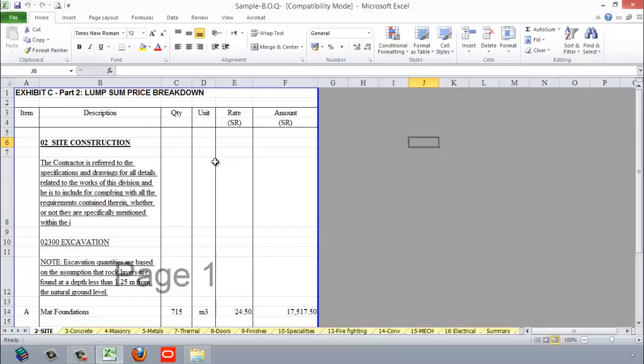Another milestone could be the superstructure. Superstructure is everything related to the concrete works, and this one could be another controlling milestone. It will help us to identify when we should finish all the superstructure, and accordingly we will schedule and estimate the duration for each activity.